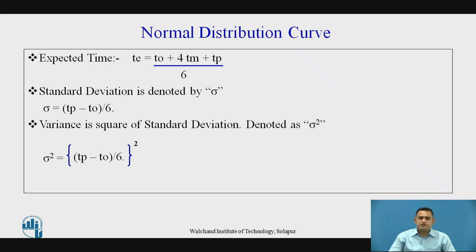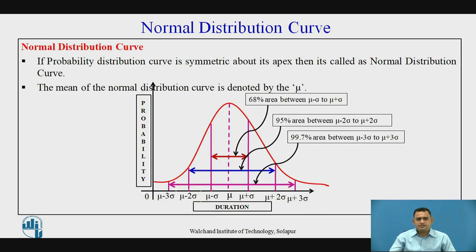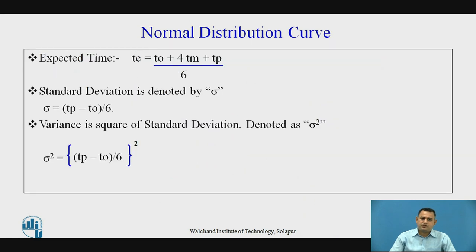The variance is the square of the standard deviation, denoted by sigma squared. The 6 in the denominator represents the range from mu minus three sigma to mu plus three sigma, that is one, two, three, four, five, six — the range from minus three sigma to plus three sigma. The coefficient 4 is given to the most likely time because most activities in the project are completed at the most likely time, so more weightage is given to it. The coefficient 1 is given to both optimistic and pessimistic time.